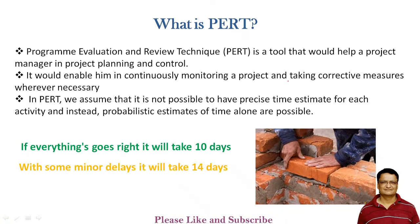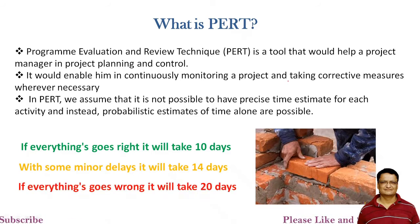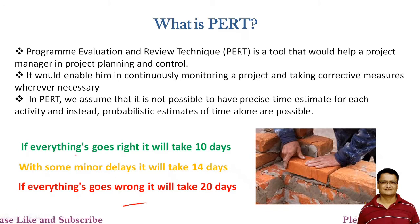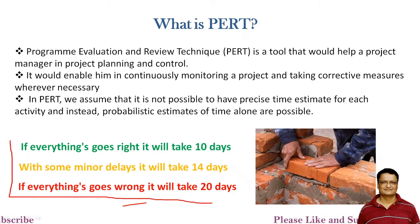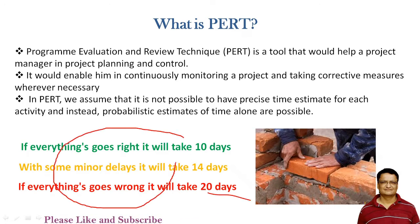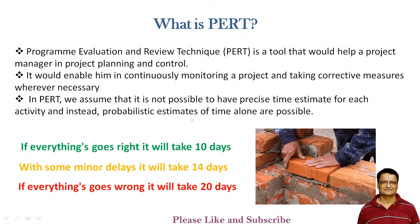Let us assume there are certain delays — the material is delayed, labor is delayed, and due to other factors, it may take 14 days. And in the worst case, if everything goes wrong and you have challenges in material, labor, and other things, it may take 20 days. This is your probabilistic estimation. We are not saying the activity will exactly take 10 or 14 days; we have some probability of completing the given activity. This particular estimate is called a probabilistic estimate, and PERT makes use of this kind of estimate.